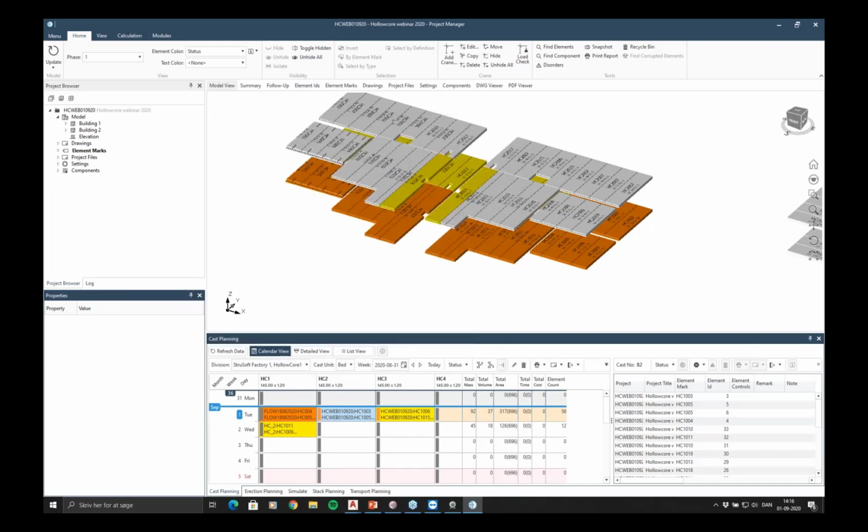And what will happen is that in my case here, status with a number of 50 and a color of orange, that means that the element has been produced. But in my case, there is a difference between produced and approved. So I need someone to approve this before I actually send it out to the customer, or before it's ready to send out to the customer.